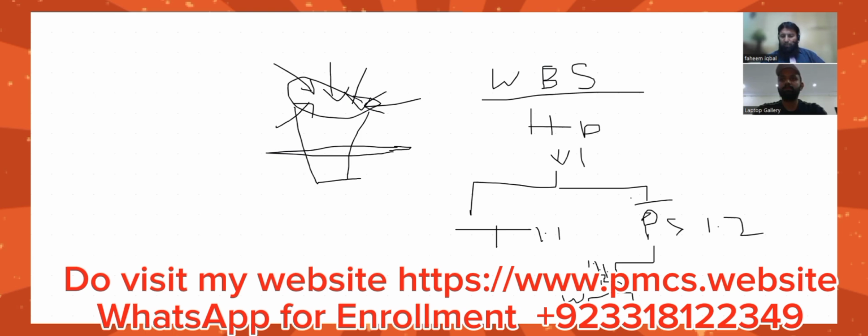Then we will divide welding further into fabrication, fit up, then inspection: VT, then PT, then MT, then UT, like that.